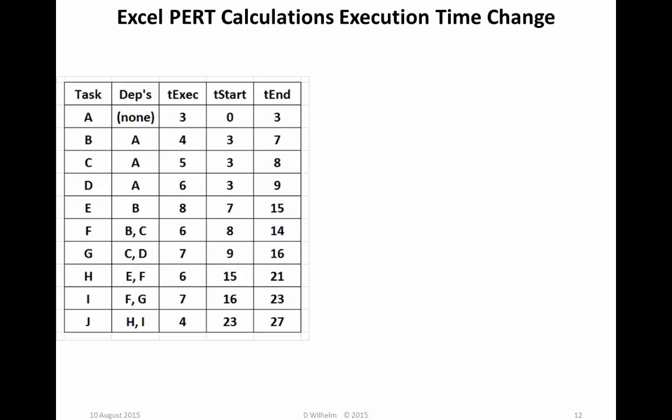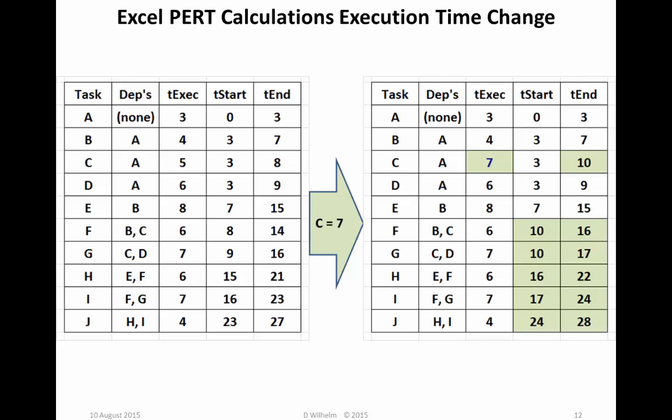Well, we've got it. So what? Well, one actual advantage over the Excel spreadsheet version of PERT charting is that we can change the execution times of any of the tasks, and they will automatically roll through the rest of the formulas to show us what has changed. In this case, if we change the execution time of task C from 5 to 7, the end time of task C will change, plus all the start and end times of tasks F through J, and the total cumulative elapsed time will now be 28.